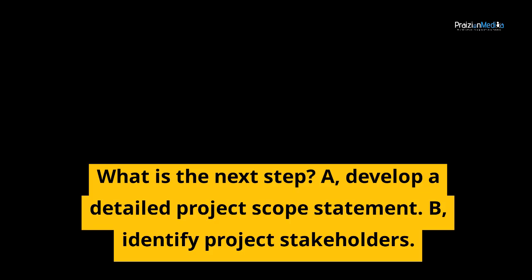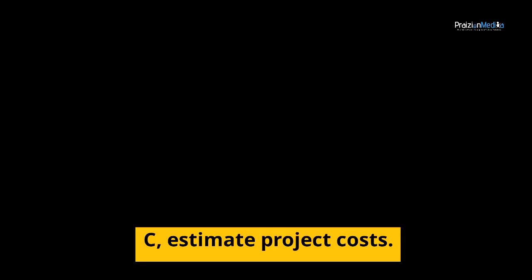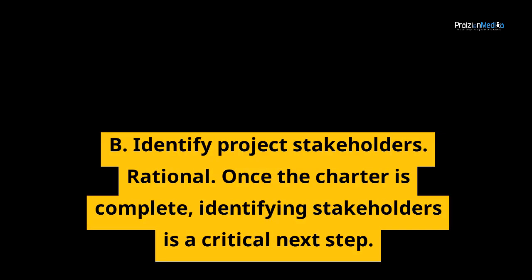A. Develop a detailed project scope statement. B. Identify project stakeholders. C. Estimate project costs. Correct answer, B. Identify project stakeholders. Rationale. Once the charter is complete, identifying stakeholders is a critical next step.